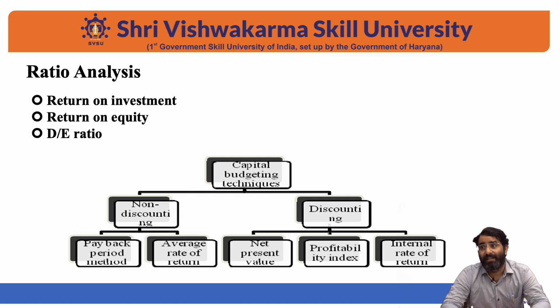In addition to this, for the financial feasibility document, the investor tries to make dummy balance sheet statements, or the projected balance sheet statements and projected cash flow statements, which he or she may require while going for some sort of debt fund, or a loan from the financial institution. They require the cash flow statement, the break-even analysis, the projected balance sheet statement, and the projected profit and loss statement. This entire set of documents is prepared at this stage by the investor.